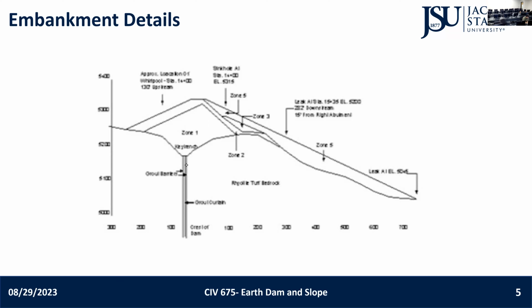Yes. That demurrage doesn't count the quality control, right? Even if the quality is sacrificed, you have to achieve the time, right? This is the perfect example of that. What goes wrong? The contractors are under extreme pressure to get it done by time. So they sacrifice the quality.